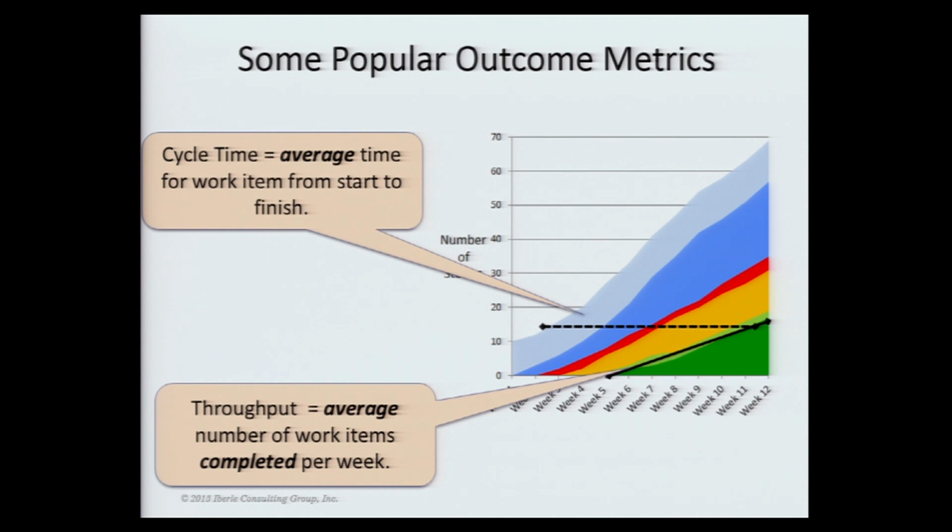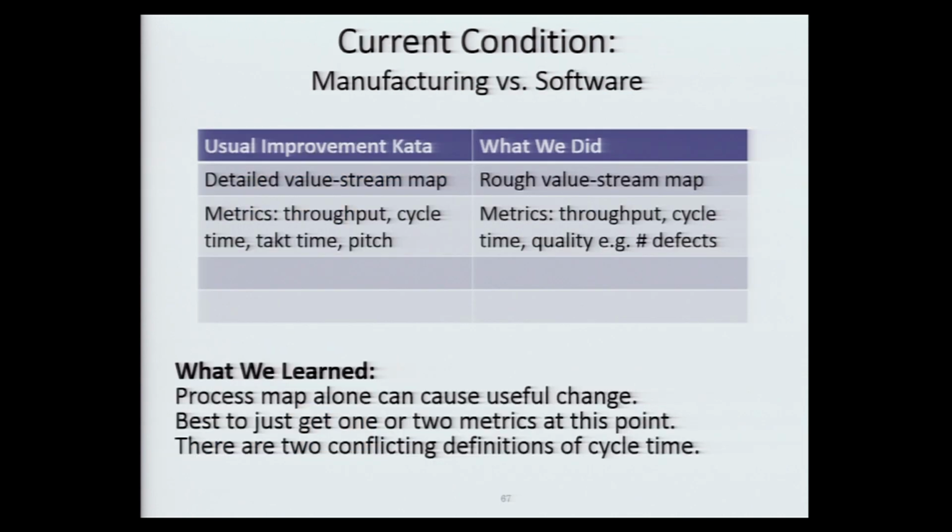And this is a really common problem that I see with Agile groups is each one has their own independent measurements. They don't have any measurements over the entire value stream. So they work themselves into these situations of, here's my development team just going like crazy, and here's my deployment team at half the speed. And the development team is really frustrated that what they do never reaches the customer because the deployment team's a lot slower. It's like, you're really not doing much there. So these were popular outcome metrics that we used a lot.